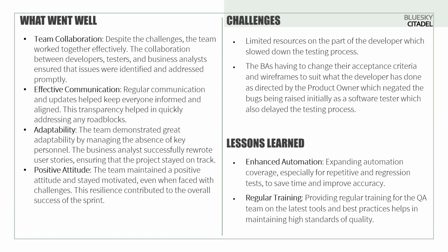So, challenges that were faced: there were limited resources on the part of the developer, which slowed down the whole testing process, and also the BAs having to change some of the acceptance criteria and wireframes to suit what the developer has done, as cited by the product owner. Lessons learned.